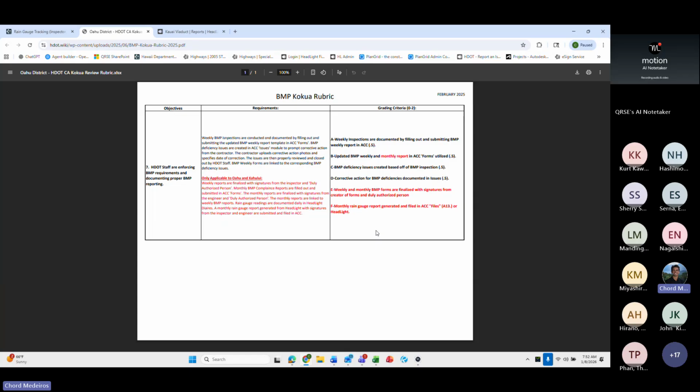And this information, like I said at the very beginning, is not only important to BNP auditors, but it's important if contractors are arguing for unworkable days later on. You're able to track the rainfall data for that day, for that month, and also what's in the diary. That will help you in any sort of situation or argument that you would potentially have with the contractor.